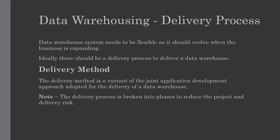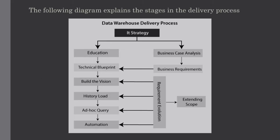We have staged the data warehouse delivery process to minimize risk. This approach will not reduce the overall delivery timescales, but it will ensure that business benefits are delivered incrementally throughout the development process. The delivery process is divided into different phases to reduce project and delivery risk. The following stages are involved: education, technical blueprint, building the vision, history load, ad hoc query, and automation.